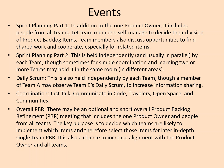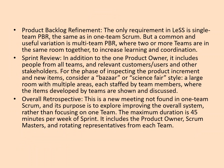Then we have product backlog refinement. The only requirement in LeSS is single-team PBR, the same as in one-team Scrum. However, a common and useful variation is multi-team PBR, where two or more teams are in the same room together to increase learning and coordination.